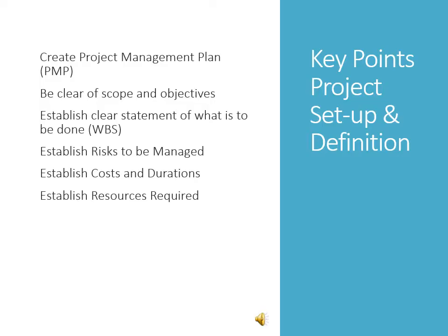Some key points to note in project setup and definition: you need to create a project management plan, what we call the PMP. We need to be clear regarding the scope and objectives. A very important aspect is that we establish a clear statement of what is to be done. We call it a work breakdown structure, which we will be dealing with in more detail afterwards. We need to establish the risk to be managed, establish cost and duration, and definitely establish resources required.